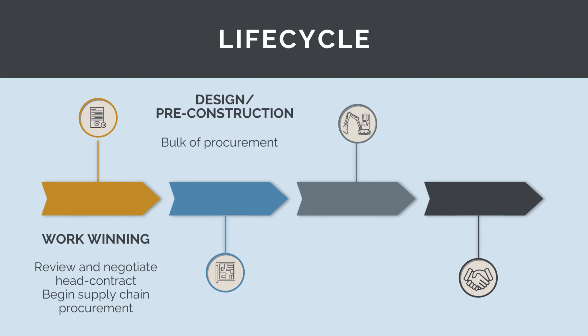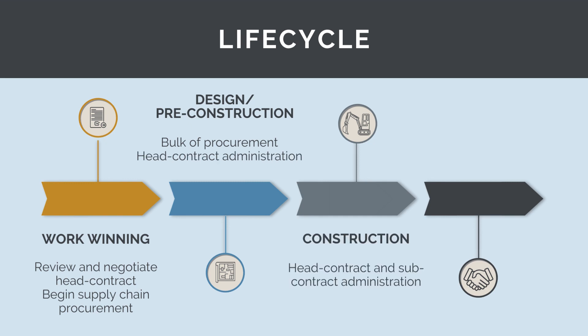During the pre-design and pre-construction phase, we'll conduct the bulk of our procurement. We will also begin the process of administrating the head contract. During the construction phase, we will administer all the subcontracts and continue administrating the head contract. And finally, in the closeout phase, we will need to close out the head contract and all of our subcontracts.